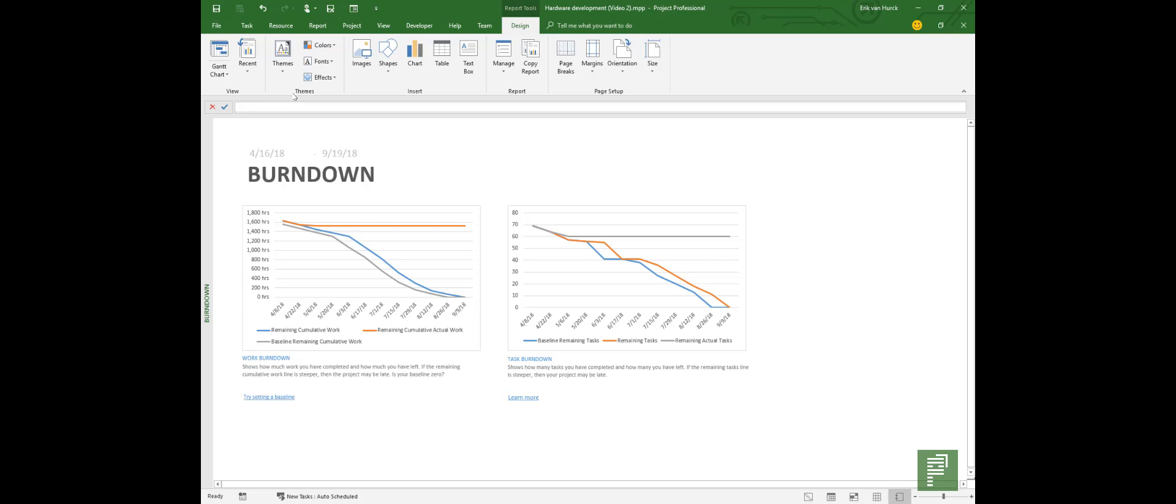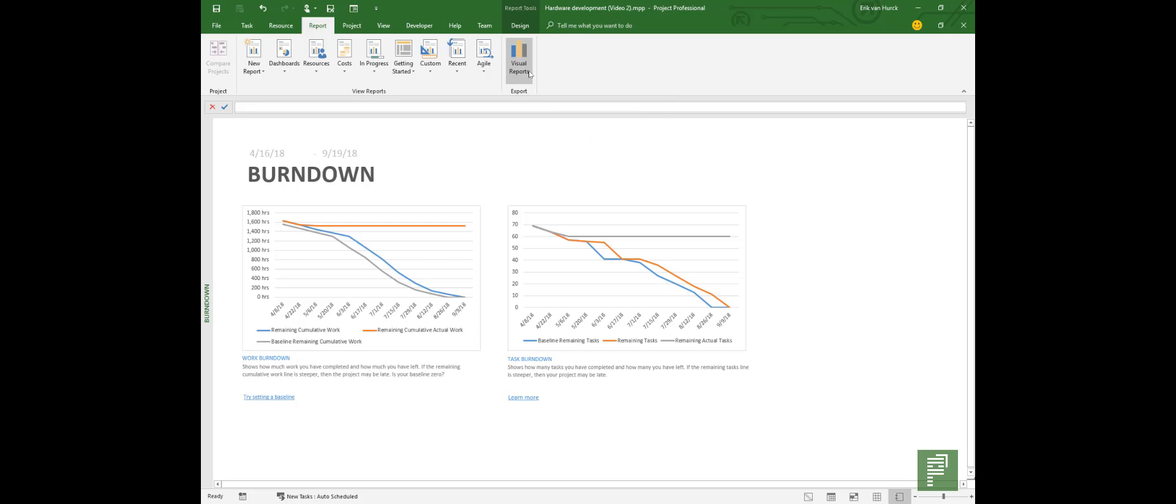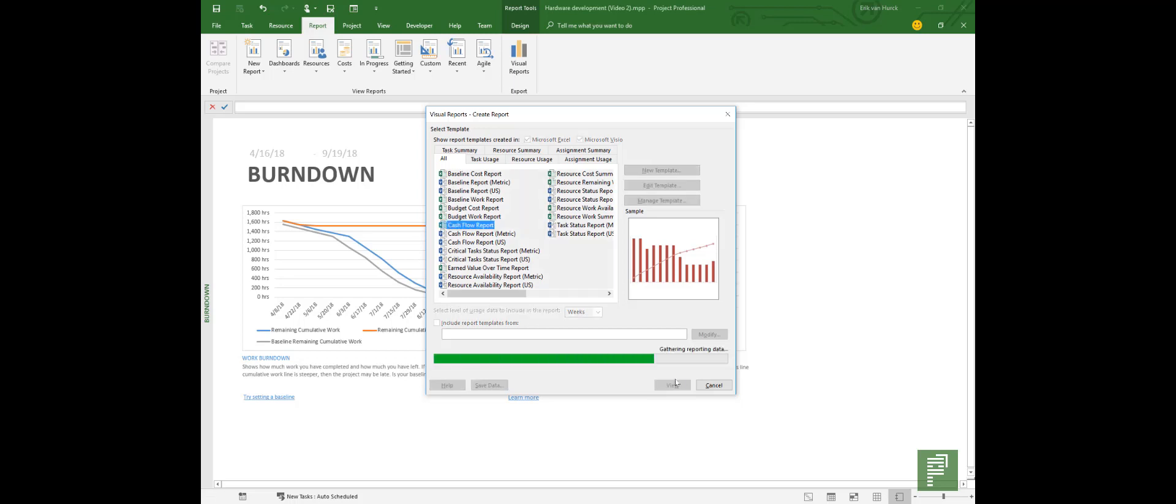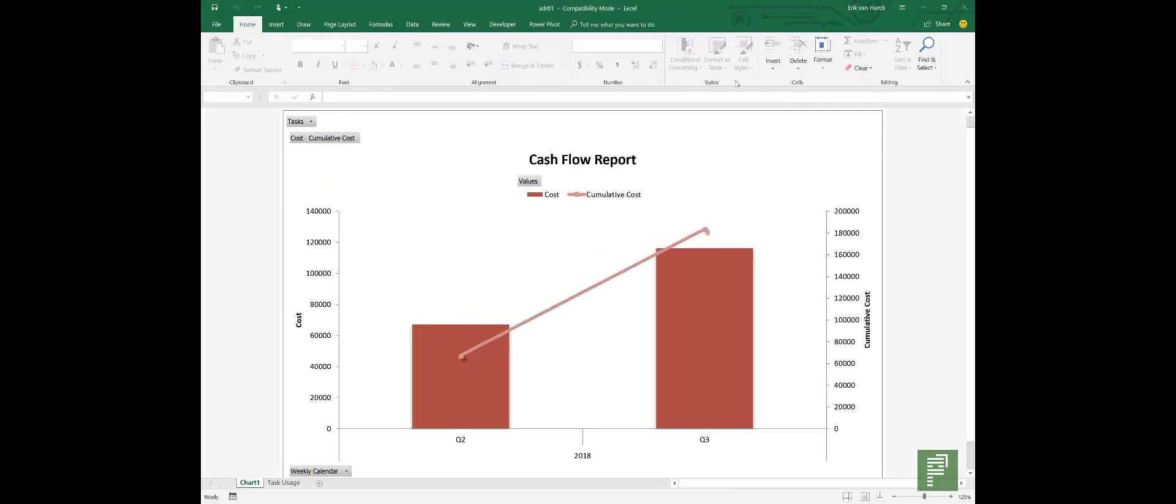So let's take another look but not on the new side of reports but let's also look into the old ones. So the old ones you can find in visual reports, and just like I said before these leverage Excel and Visio. So you'll select a template and that template will be gathered using the OLAP functionality. It basically creates a small file that is being consumed by an Excel template. If your project is bigger it needs more time, but here is our cash flow report on quarters again.